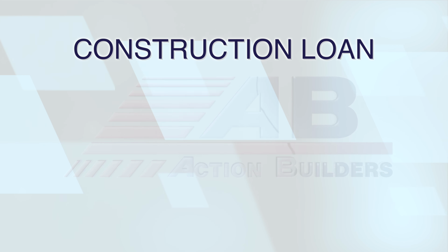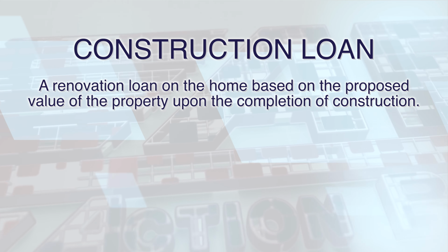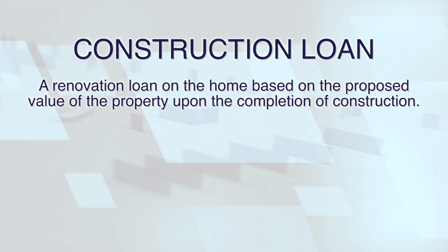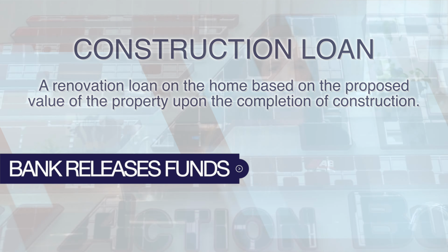The construction loan is slightly different in that the homeowner has less control of the funds during construction. They still apply for the loan, but the bank is the one that actually releases the funds during construction. So they typically send an inspector out and says, yep, framing is complete, and then they release that framing payment